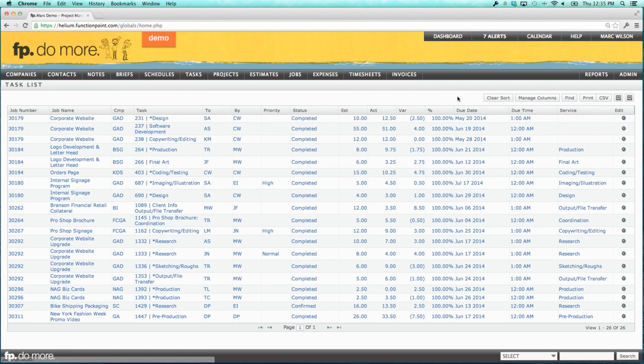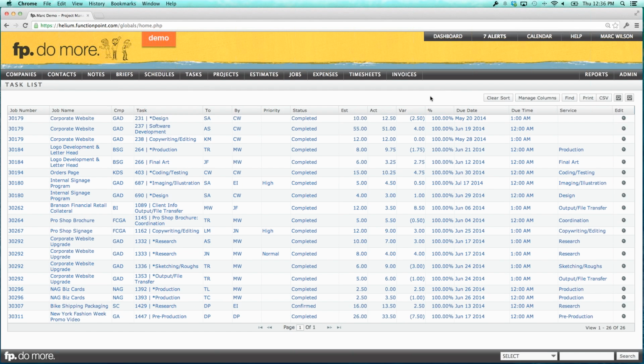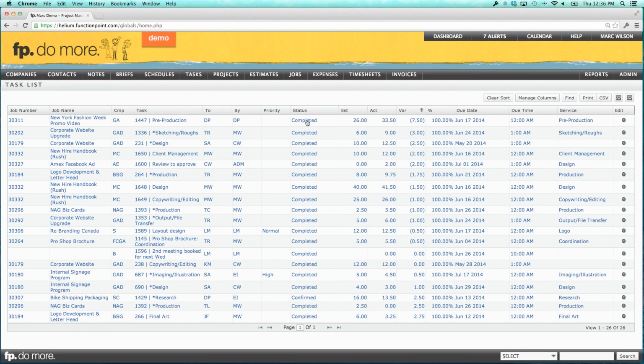That's something I was going to show. Right now maybe I'll sort it by due date, but perhaps I want to clear that sort and see what tasks we go most over budget on. So I might sort this by that column. On this pre-production task for the New York Fashion Week promo video, we went over by 7.5 hours.